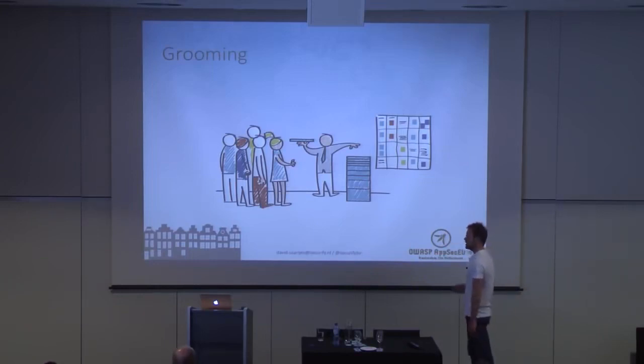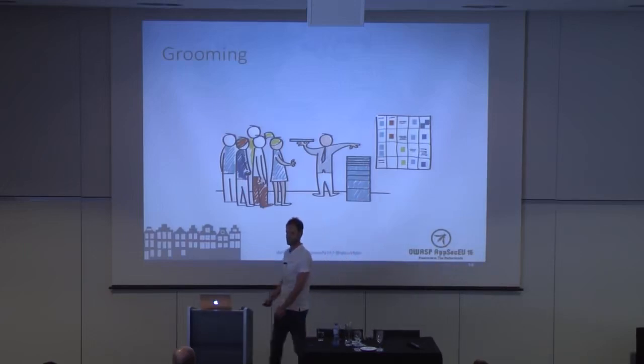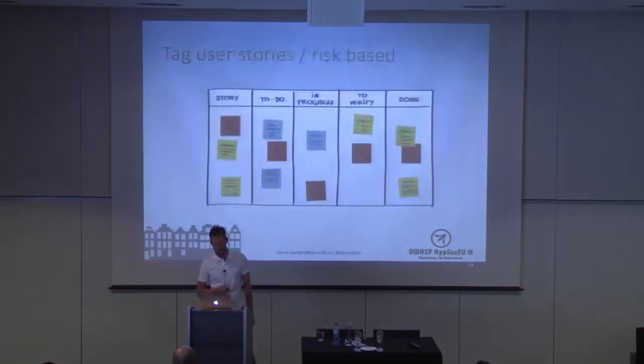So basically, in the grooming session, the team runs through the backlog, and the business analyst is presenting his user stories. The team is starting to ask 1,000 questions to get the details out on which they need to actually build these user stories. So there's a lot of technical discussions going around there. So I started to join them, and I did this for about 2 months just to get really acquainted with their process. And the next thing I started to do was tagging their user stories.